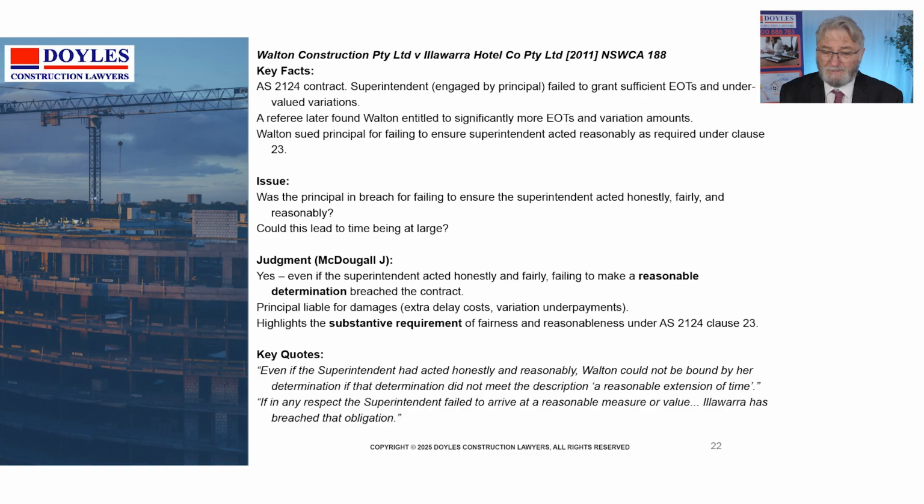It promotes the common sense aspect that in most contracts, fairness and reasonableness will probably get you home, but it's not something which you want to bet the farm on. You can't do every contract and bet the farm on it. So the question was, even if the superintendent had acted honestly and reasonably, Walton could not be bound by her determination if it didn't meet the description of a reasonable extension of time or a reasonable measure of value. So it was one in which the contractor had narrowly survived what was otherwise a problem for it.